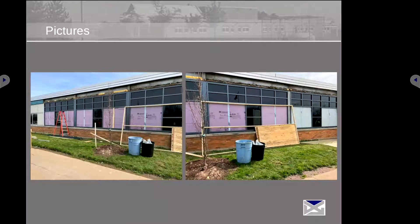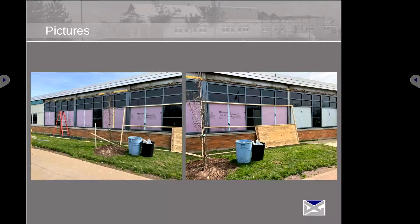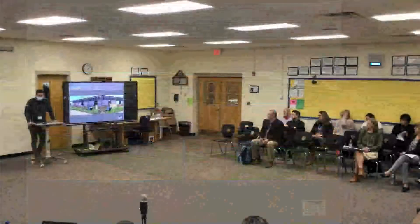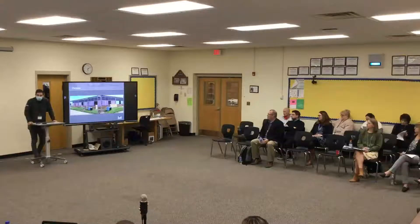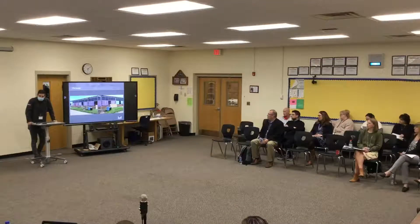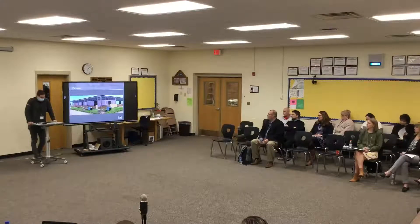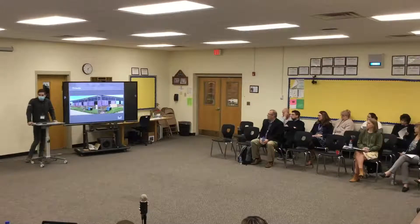Is the window install going well with the frames and all that? It's going great. They are picking up their crews tomorrow, so we're just going to keep going as swiftly as possible. They have a great system — pulling the old windows out, boarding them up, then the demo guys take them out while the glass guys put the new ones in. When we jump into other parts of the building there's a little more abatement needed, but we've had no issues so far.